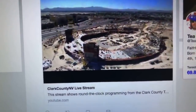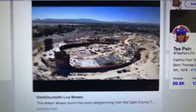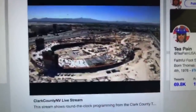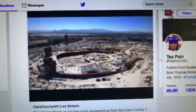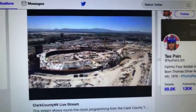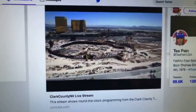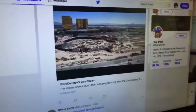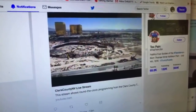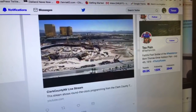So the very prominent structures to your left there are the cores of this building, vertical transportation, elevators, things like that. But they also anchor horizontally the structure. And that's really where the challenge in concrete has come. It's not in the placement of concrete for slabs or decks, but it's in those cores simply because the rebar is so complicated and it's just taking longer.